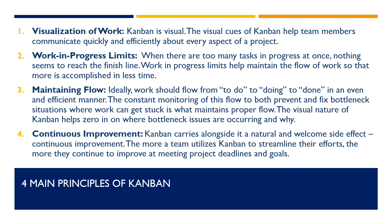The second principle is work-in-progress limits. When there are too many tasks in progress at once, nothing seems to reach the finish line. Work-in-progress limits help maintain the flow of work so that more is accomplished in less time.